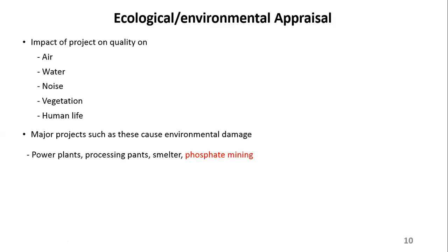It can actually stop it. Even if it was accepted, even if the financials make sense and technically everything is good, if in terms of environment there's a big problem, then there's no way you can go ahead with that project. Okay. The typical projects that can cause environmental damage include power plants, like that example that was given there, processing plants,